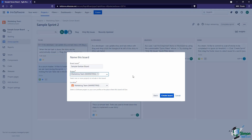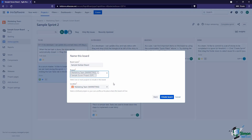Now we need to choose the project whose issues we want displayed. So if we choose the Marketing Team project, it's going to have all of the issues in that project displayed on this board. We don't have to have just one project's issues showing up — we could have multiple projects showing up on this board, even though the board itself can only live in a single project. The key thing to keep in mind about the location is it's going to be based on permissions — who has permission to view the Marketing Team project will also be able to see this board.